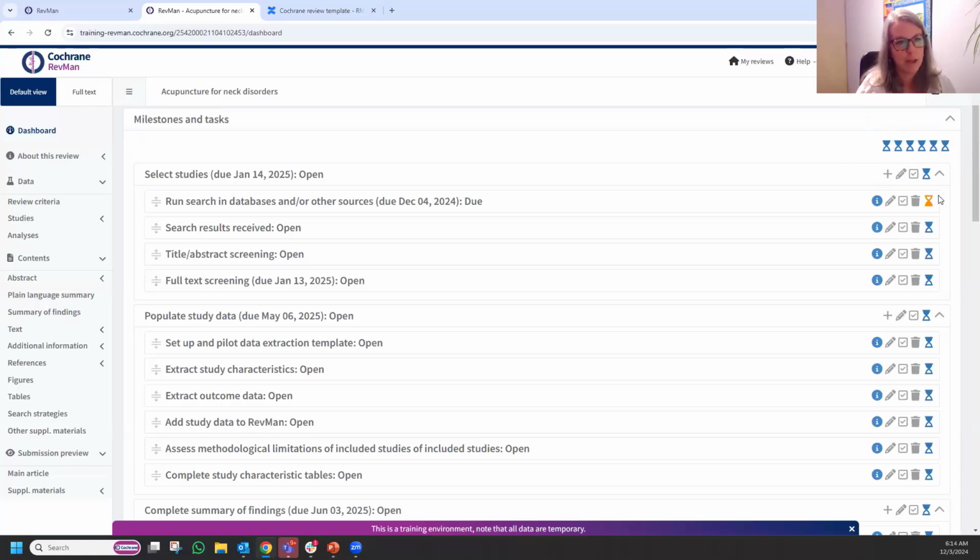And when these are coming up due, you'll see an orange icon. And then should the milestone become overdue, there will be a red exclamation point to say, hey, according to the initial 1-year timeline for producing a review, this is overdue.